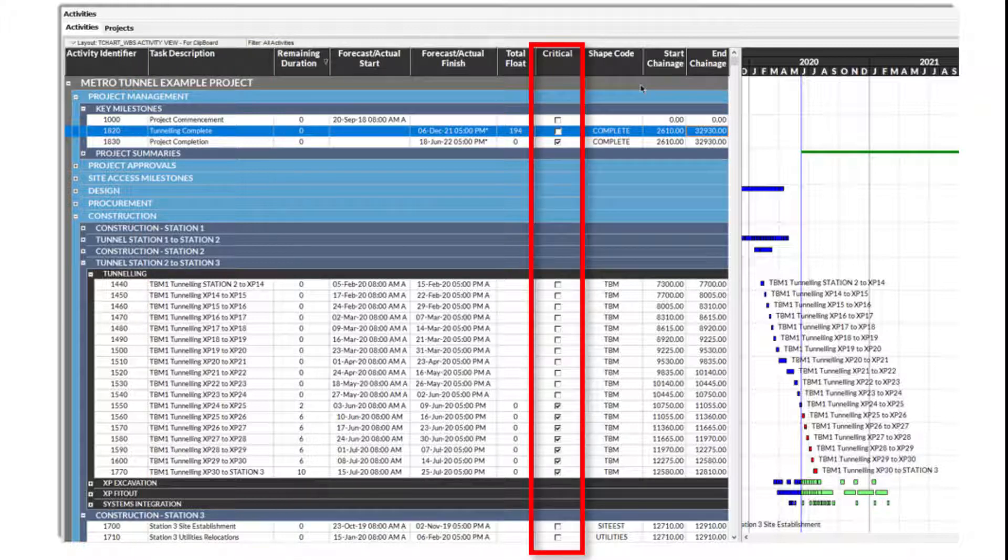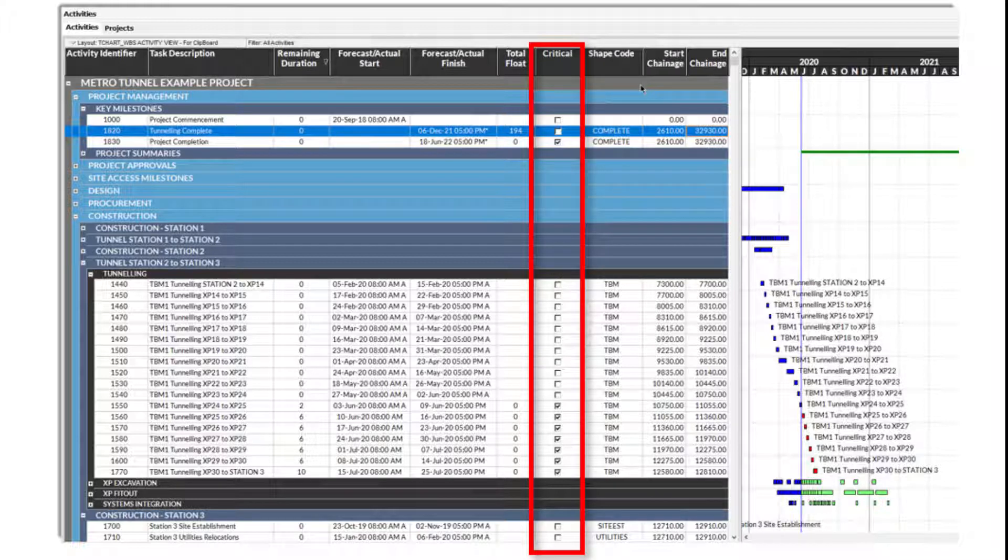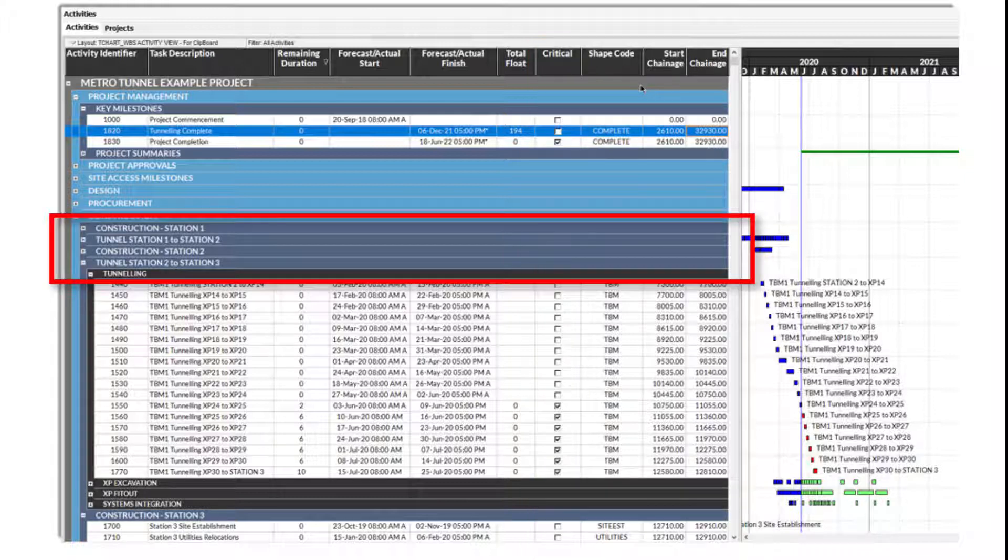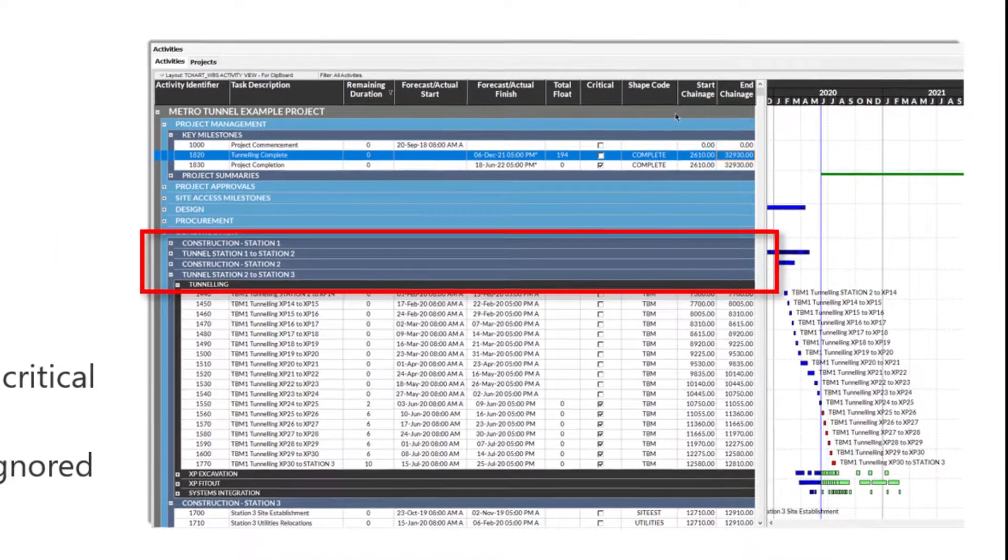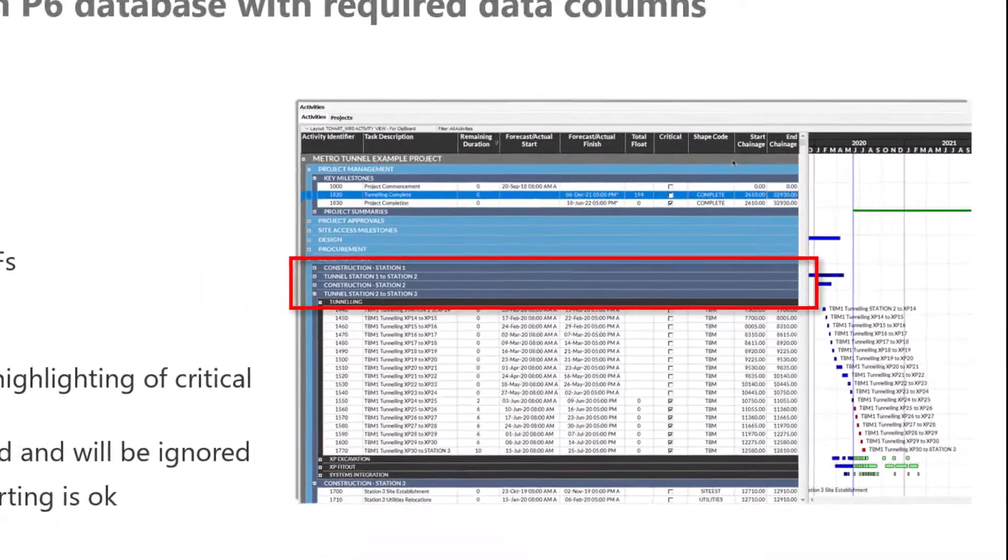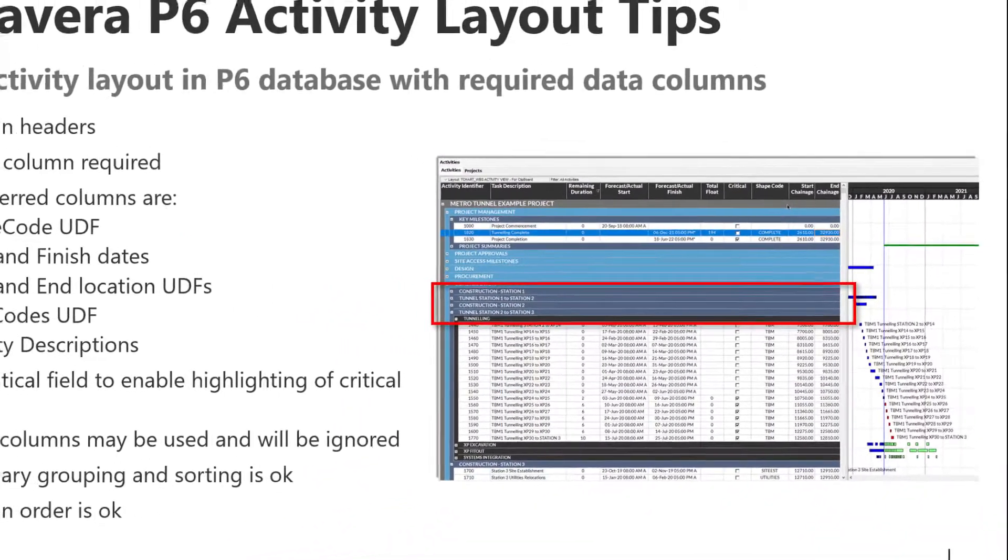Using the P6 critical data field will also enable the display of critical tasks in TurboChart. Any other data columns can exist in the activity layout and will be ignored by TurboChart. Likewise, any grouping and sorting may also be used as these will also be ignored. Finally, the order of the columns is not relevant for importing into TurboChart.